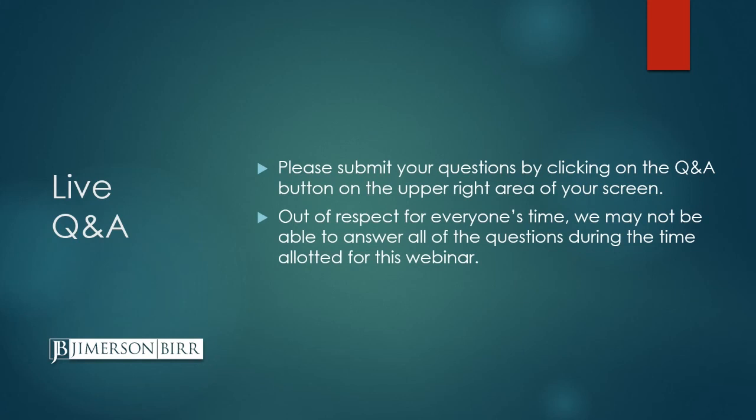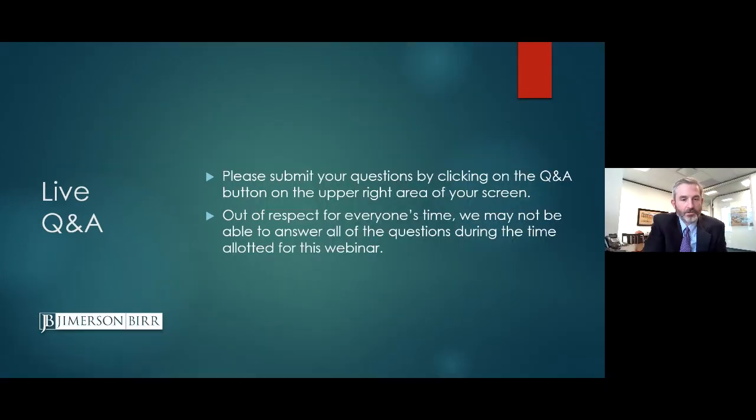Yeah, I'll take that one, Elizabeth. That's actually a really good question. Typically, what the courts in Florida have said is that the surety on the payment bond is not able to assert the pay-if-paid provision as a defense to a subcontractor claim on a payment bond. And that is unless the payment bond expressly incorporates the subcontract, which is not that often. So that is a potential way. If you're on a bonded project, even if you have a pay-if-paid provision in your subcontract, you may still be able to look to the payment bond for recovery.